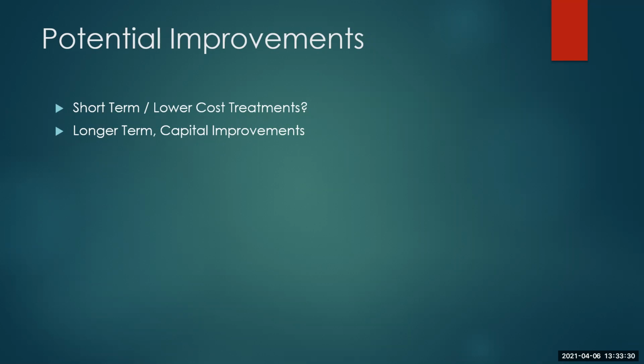Realistically, if you started design today, it'd be 5 years, but realistically, for a project like that, you're looking maybe 6 or 7 years out at the earliest, unless for whatever reason it moved really quickly. So we would definitely mention signalization at this location. I believe that when we did that corridor study, it did satisfy signal warrants, but we would update the warrant analysis for that.